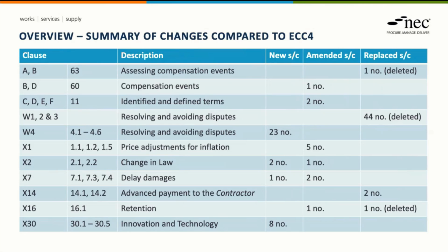The main changes, as you can see, in terms of removing clauses, are the dispute clauses, W1, 2 and 3, that have all been removed, and the introduction of W4, which deals with dispute resolution following the security of payment provisions and general practice in Hong Kong.